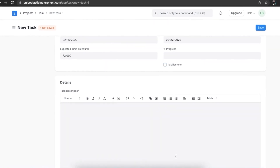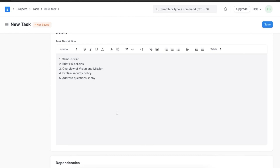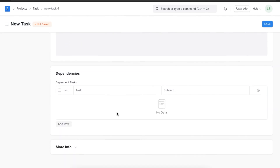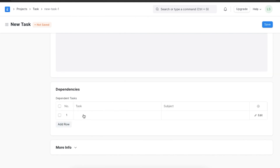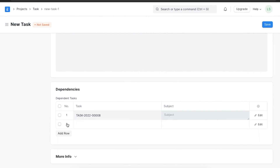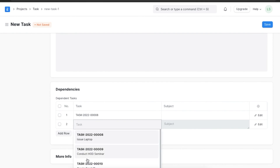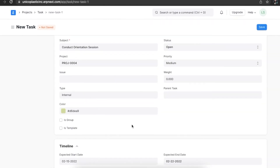In the detail section we can add a task description. Since we are creating a task for conducting an orientation session for a new employee, we can list the activities to be done as part of the orientation. The dependency section helps us define if this task has any other dependent task without which the task can't be marked as completed. Suppose we want to add a dependent task — we can do that by clicking on "Add Row" and selecting a task. Once we've added all the details, we can save this task.